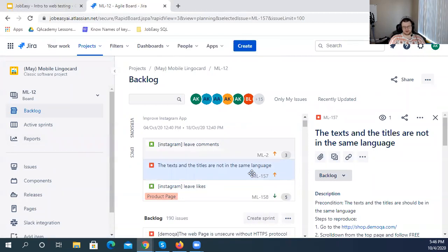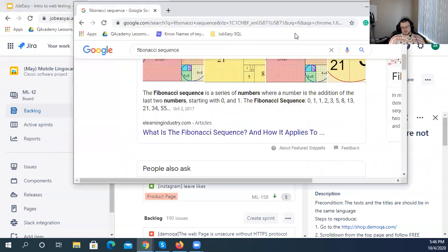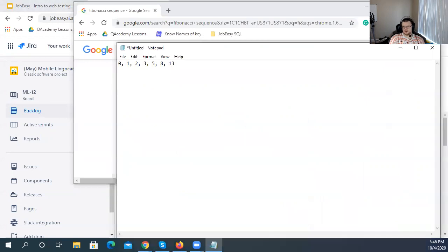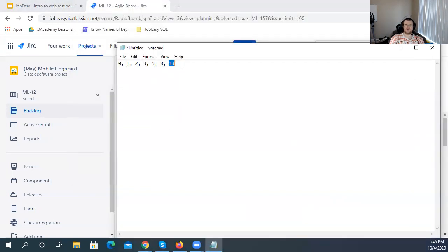Now, the complexity of stories, how much time it's going to take to finish the story, is determined by developers during the meeting. Developers together vote on the story complexity and assign points to it. Those points are assigned in the Fibonacci sequence from 0 to 13. Anything that is more complex than 13 is pretty much an epic already, okay? In this case, 13 means a workload of about 2 weeks. It's not set in time, but 8 points is about a week. 5 points is, and 3 points is a medium complexity story.